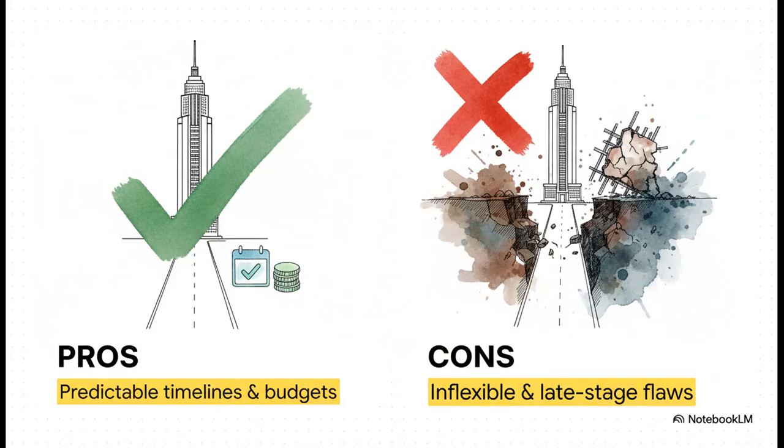Now, the biggest strength here is that predictability. Since you planned everything out, you get really clear timelines and budgets, which managers love. But, and this is a big but, that same rigidity is its greatest weakness. What if the customer's needs change halfway through, or you find a huge problem during testing, way at the end? Going back to fix it can be a nightmare, incredibly expensive and disruptive.